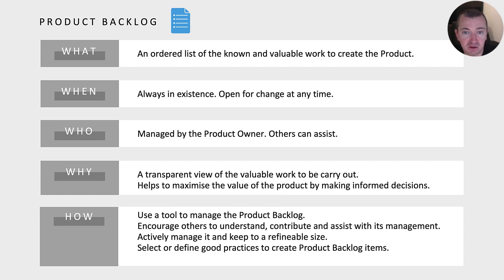Effective product owners don't let product backlogs get too long. As it increases in size, more time and resources are required to manage and refine a product backlog, which will introduce waste and limit the Scrum team's ability to deliver value. A good practice is to keep the product backlog limited to items that realistically can be developed over a known period of time. Ideas and other unlikely work can be removed and stored elsewhere.